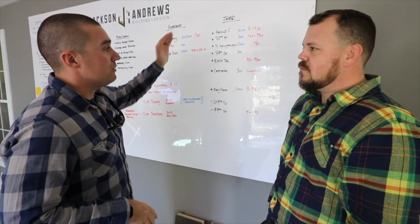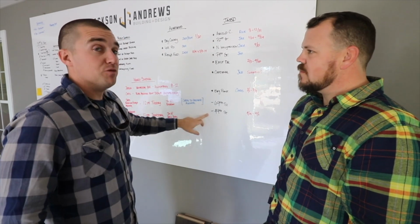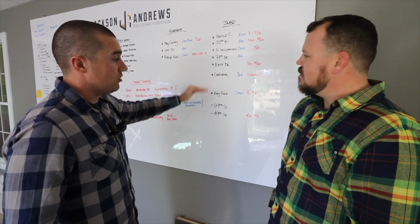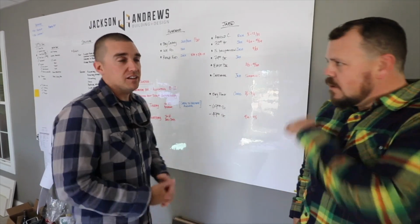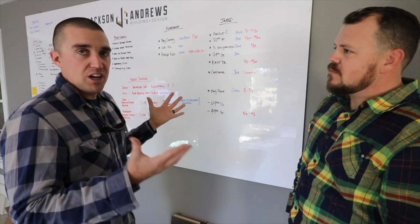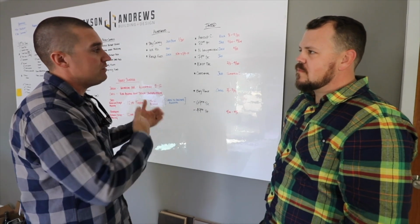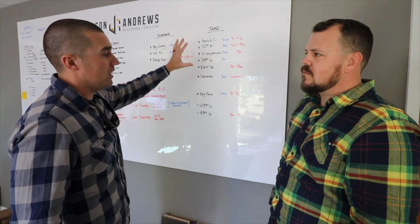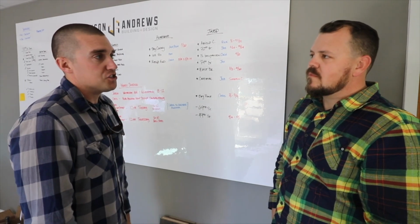So we've got to be really diligent with this, and as we are committing, some of these jobs are contracted, some of these are prospective jobs. We're debating and talking even with clients right now, can we guarantee that we'll be here on this date? And a lot of that will dictate what the scope of work does. Of course, there's always changes, unforeseen conditions that can come up on a job that impact the schedule, so we're always having to be really careful on how we allot time for a project, especially when we've given someone a firm start and completion date on a job.